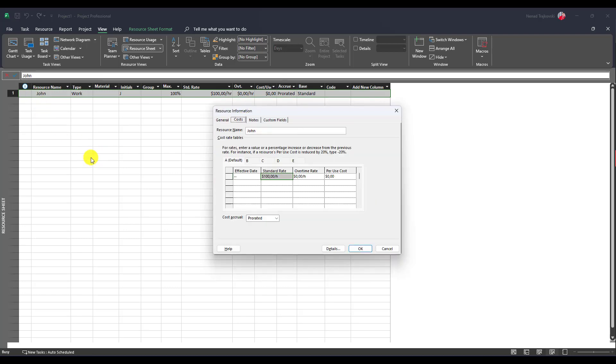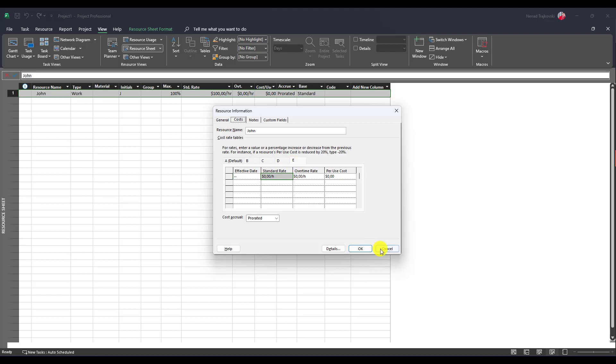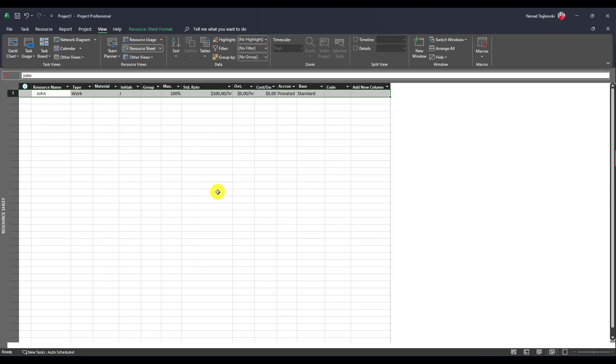we will go to costs and we will see that default is 100, but we have four other options, table B, C, D and E, which are zero. So, any of them is zero. So, I should apply different table.